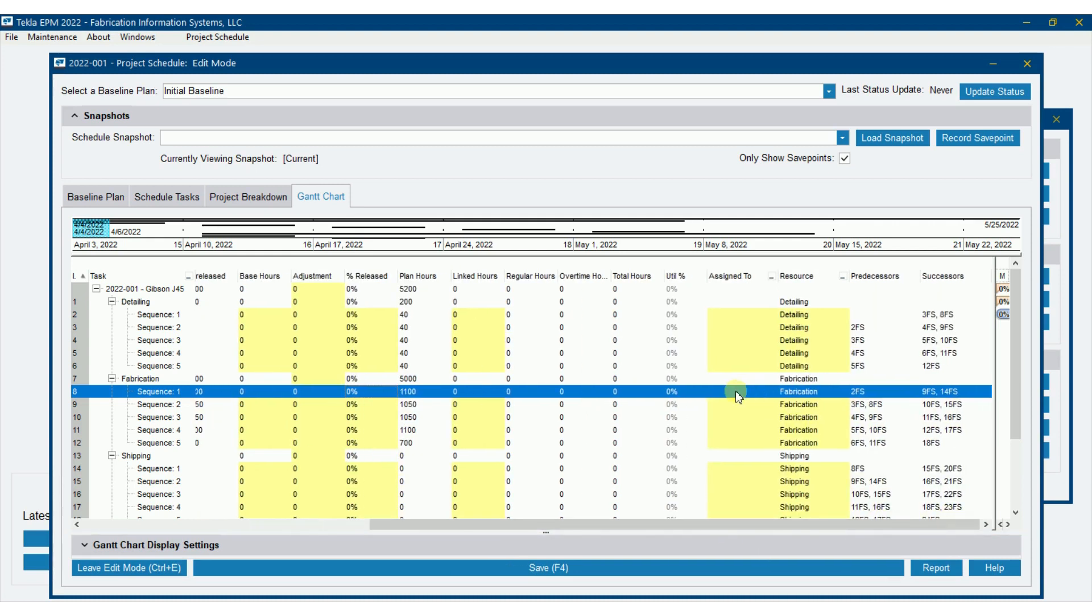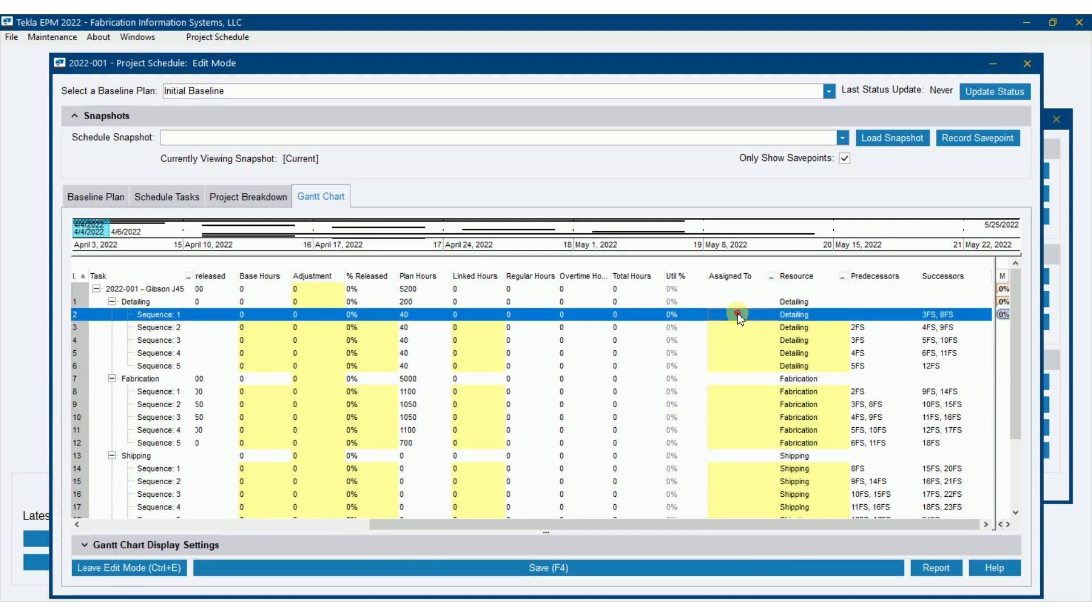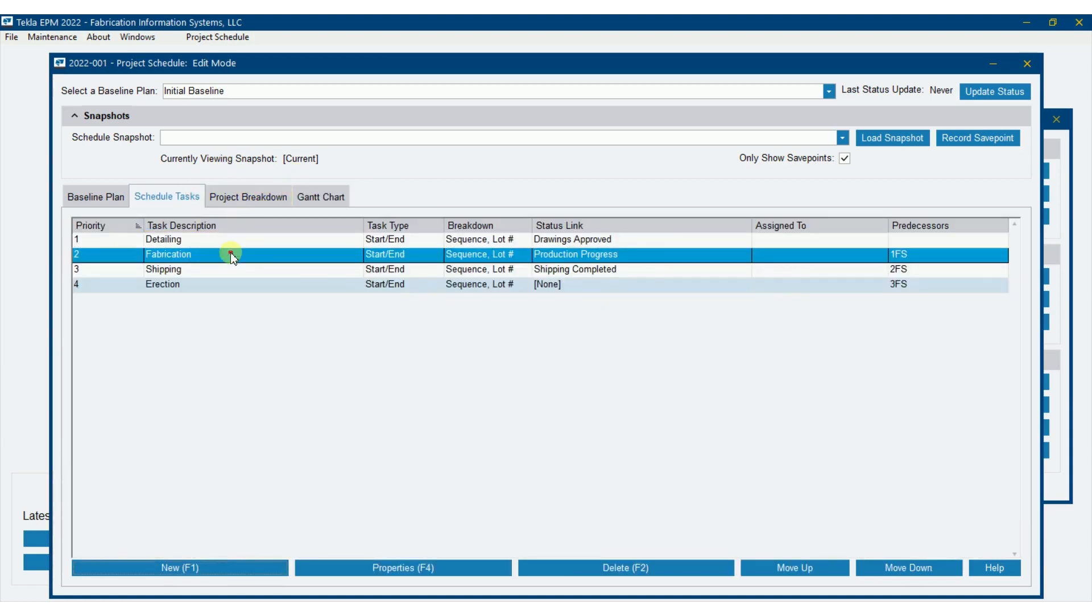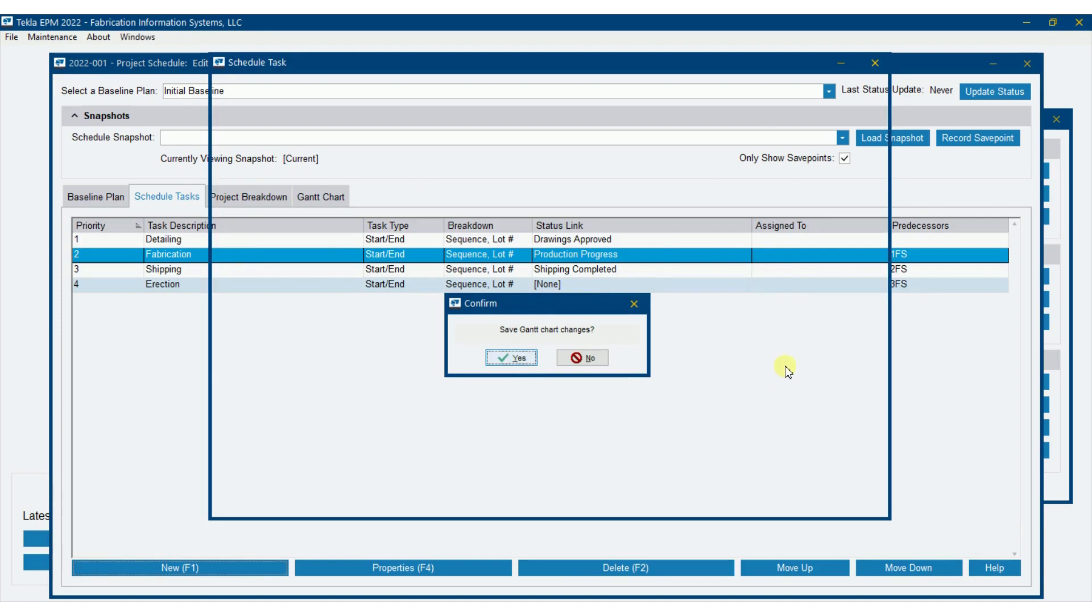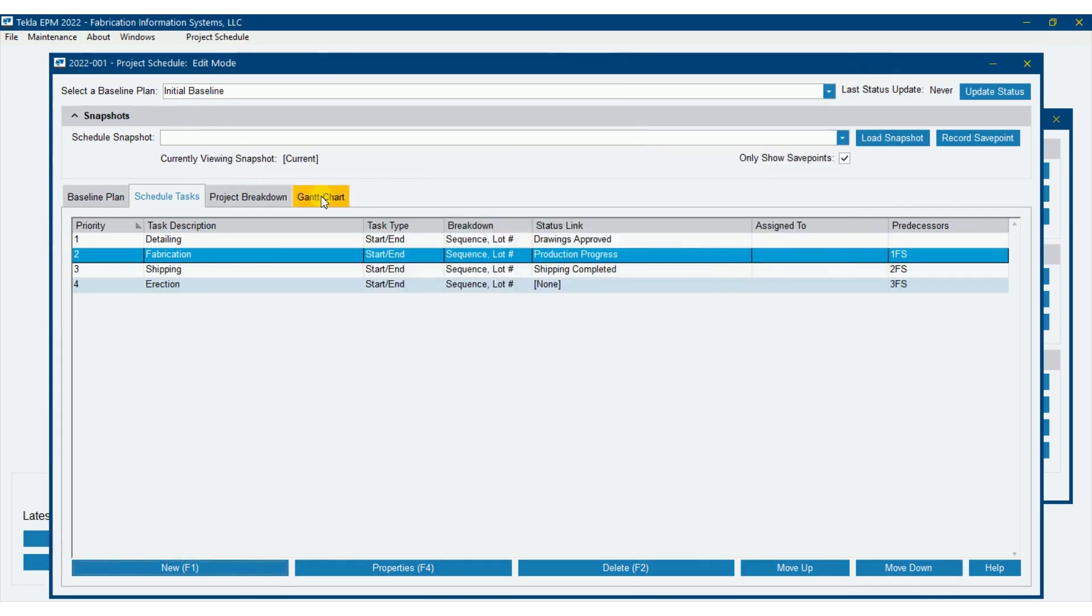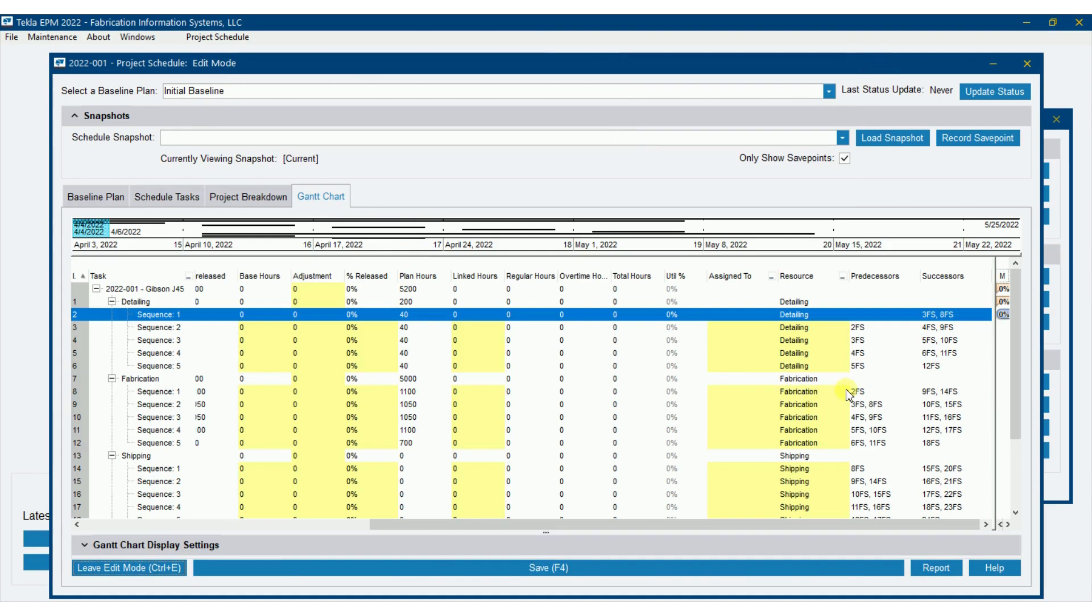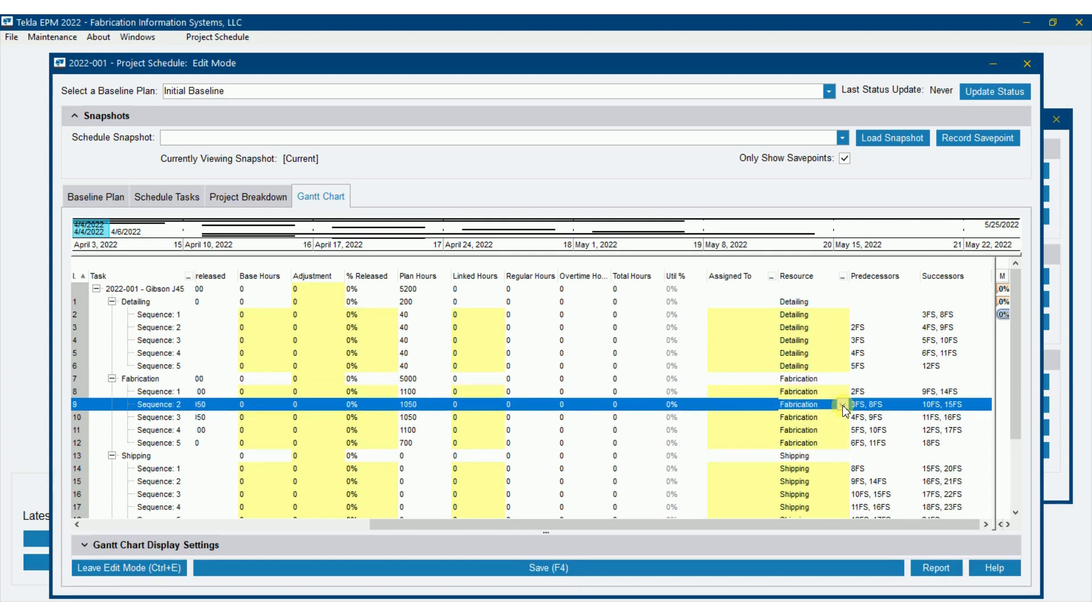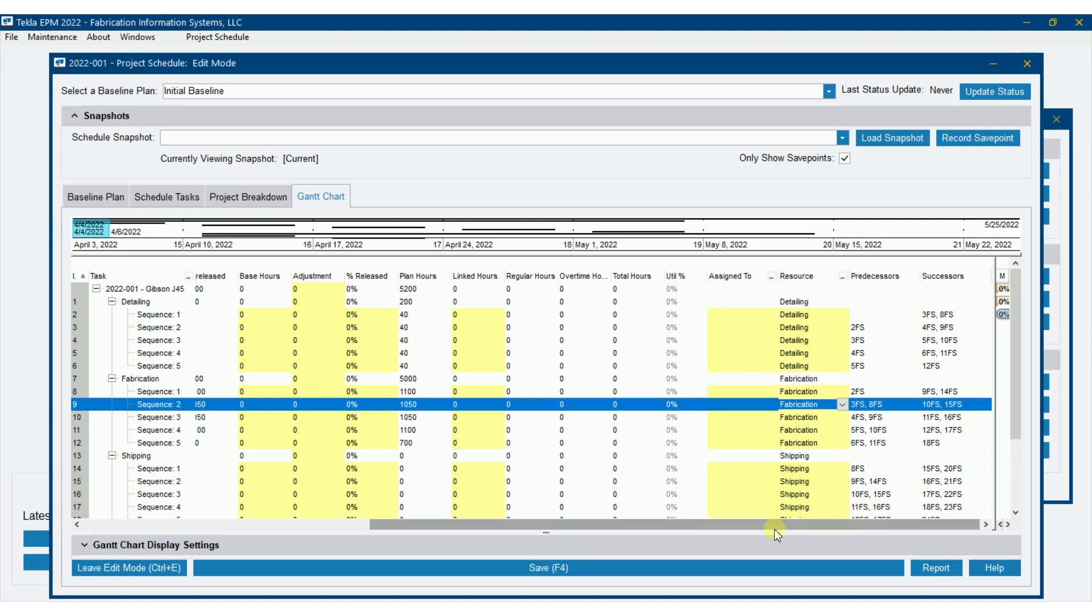And then we can assign these to a particular person if we needed to. It might make sense on detailing. If I was doing a detailing schedule, I would probably want to assign this to a particular detailer if I had just one guy working on it here. It shows up in this task. Resource that we assigned back here on our scheduled tasks. There's the resource that we assigned. I could also just do that on the Gantt chart. So like for instance, I could choose a different one here. And this might make sense for those of you that have multiple shops where you might be doing sequence one in one shop and sequence two in a different shop. So you could assign those resources separately there if you would want to. Then we've got some predecessors and successors showing up here just for our informational purposes as well.